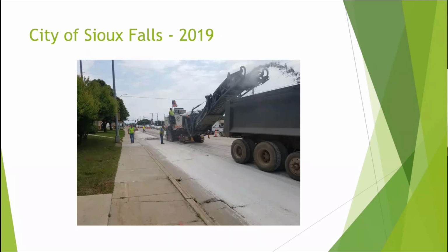A number of different jobs in the city of Sioux Falls. Kurt was down on a couple of these as well. You can see the old pavement here, pretty poor condition. This was about $28 million to rebuild and reconstruct this section. So obviously that wasn't going to happen, not counting the shutdown of the roadway while they were doing it. So did some repairs, did some scratch profiling, and then did